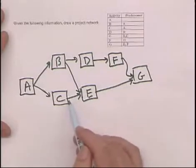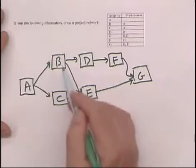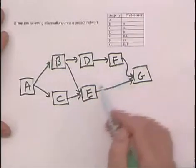E can't start until more than one activity are completed. In this case, it's B and C. In the case of G, it's F and E.